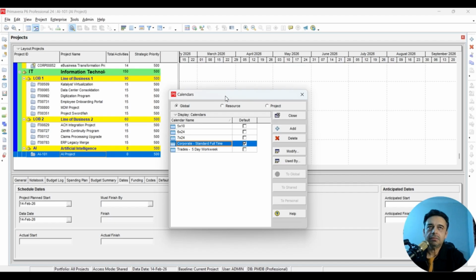Again, for example, you have different constraints by the management or by the customer that the project must be delivered by end of the year or by end of the month. Then you will have to use a different calendar. You need to make sure that all the team members are working 7 days a week and there are no holidays. So that is the reason we must finalize the calendar before we start anything else in our project.